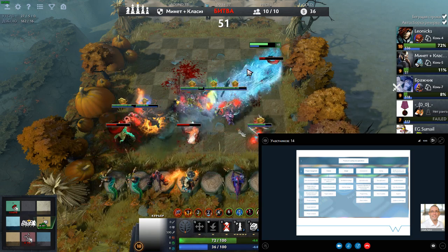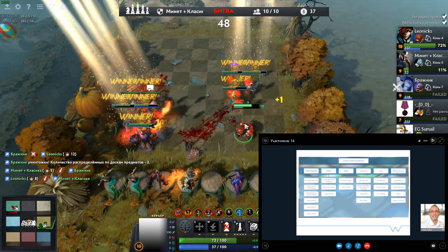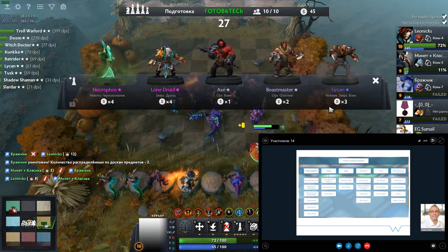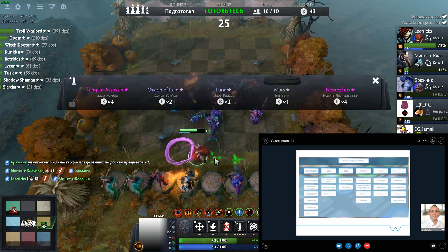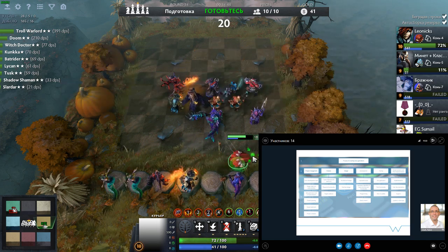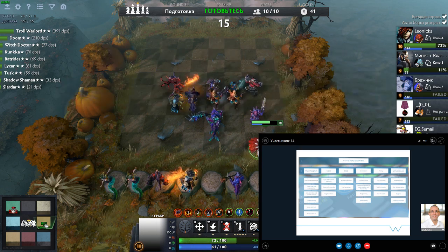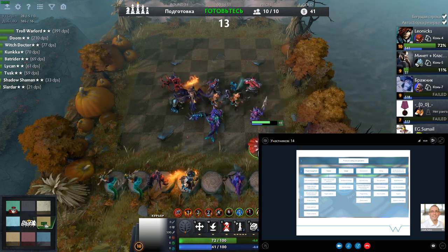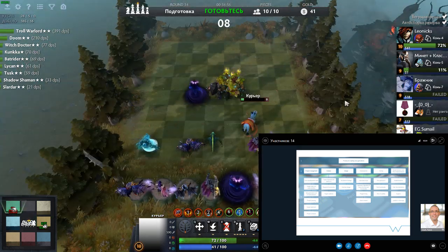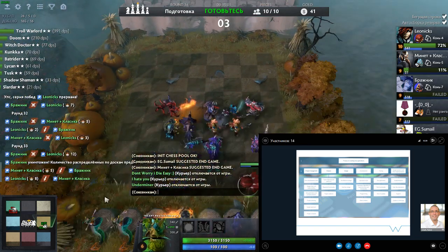There may be some arguments as to whether or not the order of things going from left to right on the second layer is the best representation. I think it's important, although there is no time or flow element really to a work breakdown structure. You do want to make sure that generally as you go from the left side of the structure to the right hand side, if possible, you incorporate enough logic in there to make it seem as though it flows quite naturally.